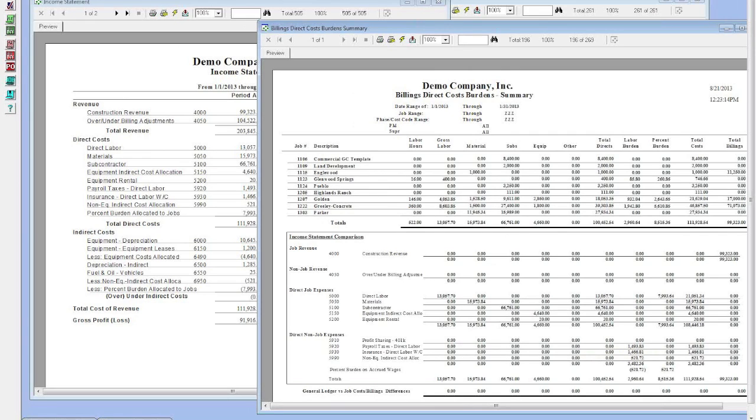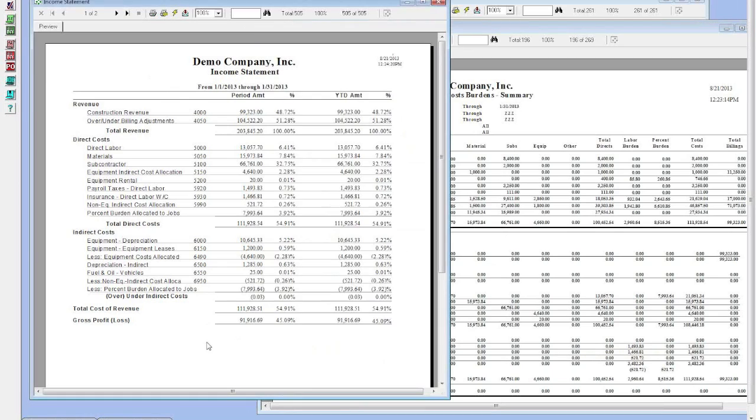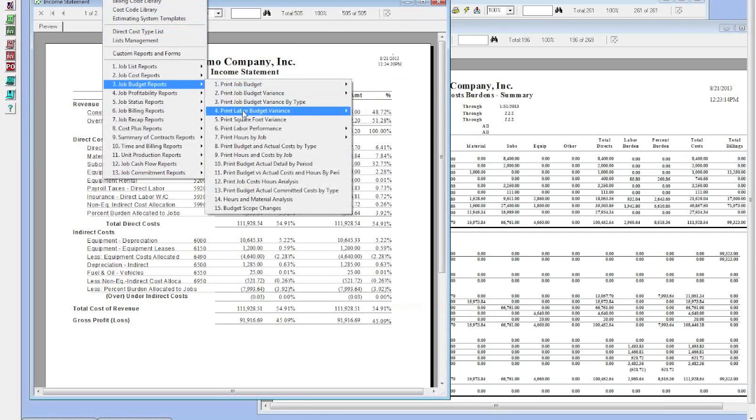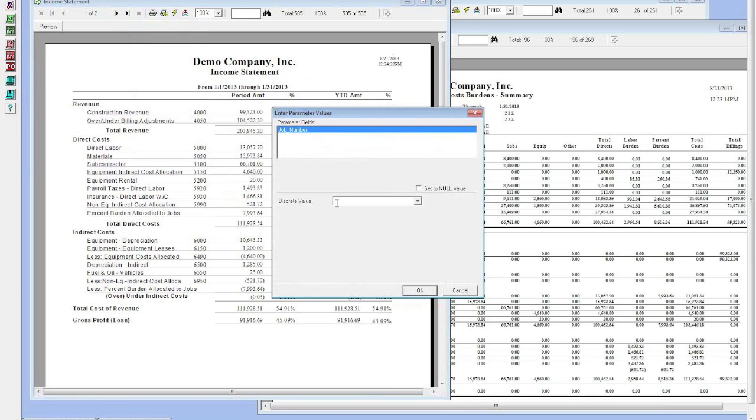So our job cost is based on the cost that hit the jobs. The difference between your job cost and your general ledger, which is your total cost of construction, basically cost of revenue here, and the job cost that hits your summary contracts will be your over under allocated indirect costs. So the loaded labor factor that the estimators are looking for, this is a good report here to pull that out, can be reasonably relied on if you don't have any over under allocated indirect costs.